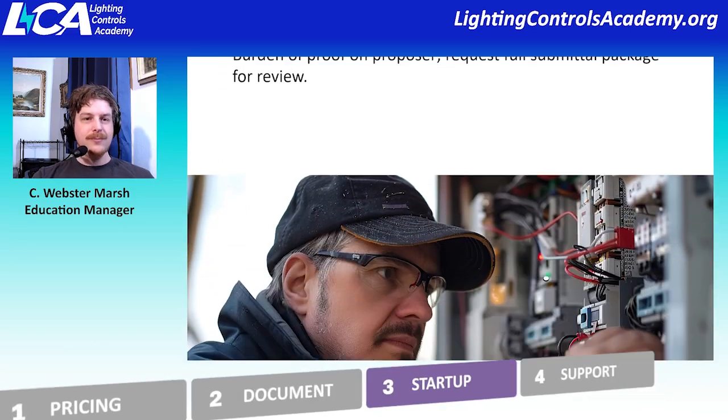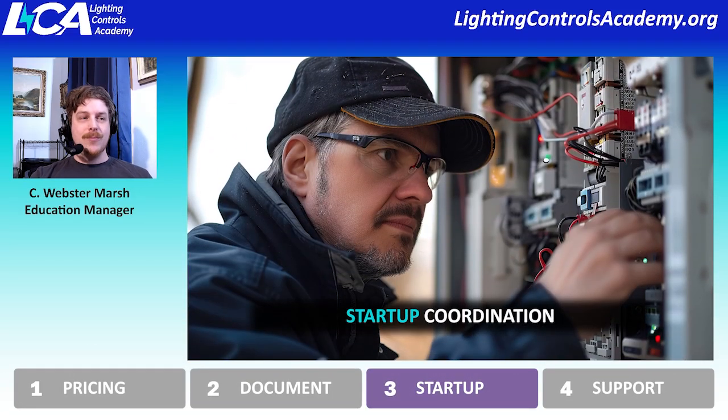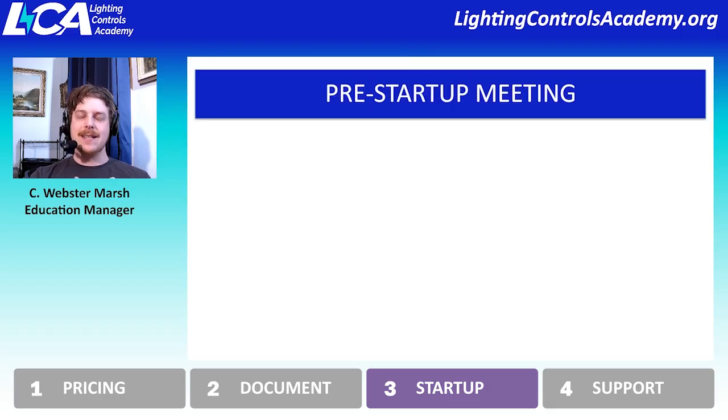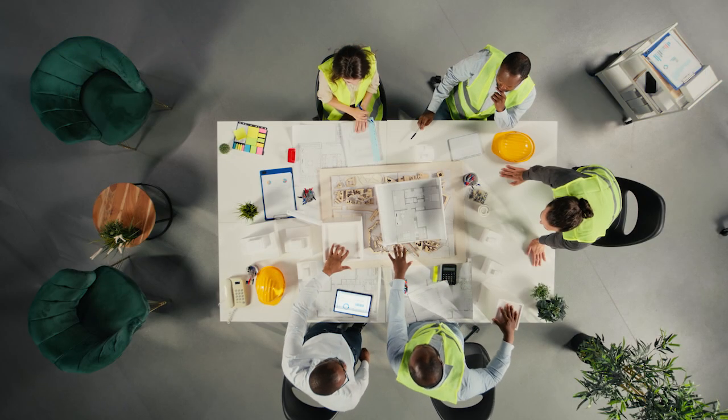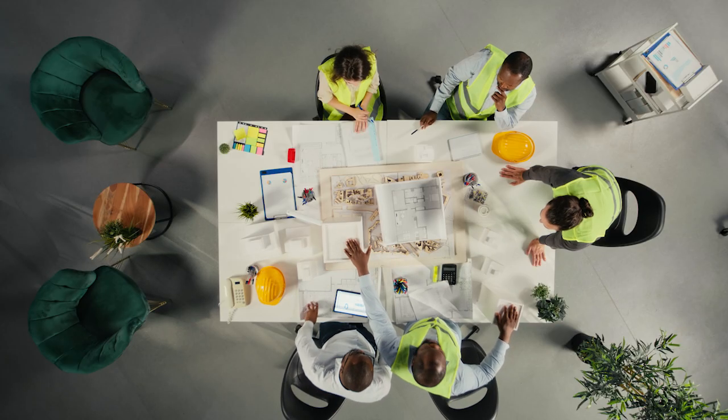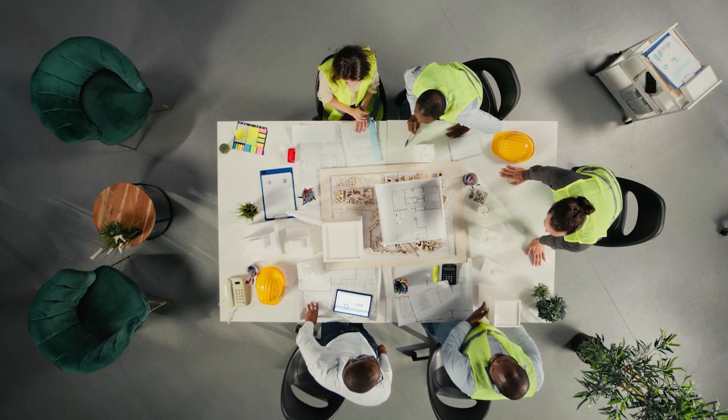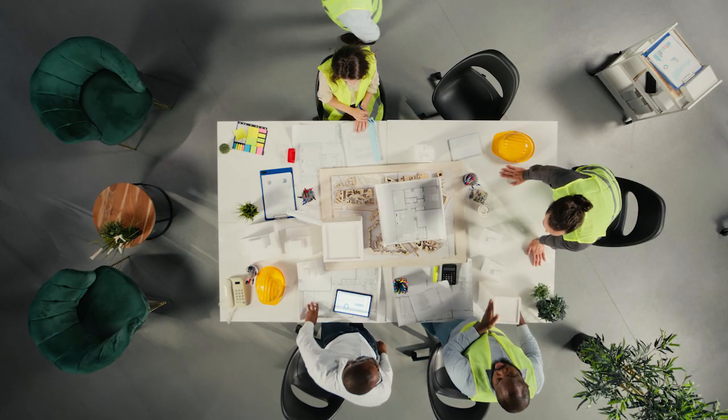All right, so startup coordination. I've used this term startup a few times now, and let's get into what that really is. The very first thing you want to do is have a pre-startup meeting, which you're really going to go over the entire submittal. So oftentimes it'll be scheduled after the approved submittal is done, but before there's any delivery or installation of the system.